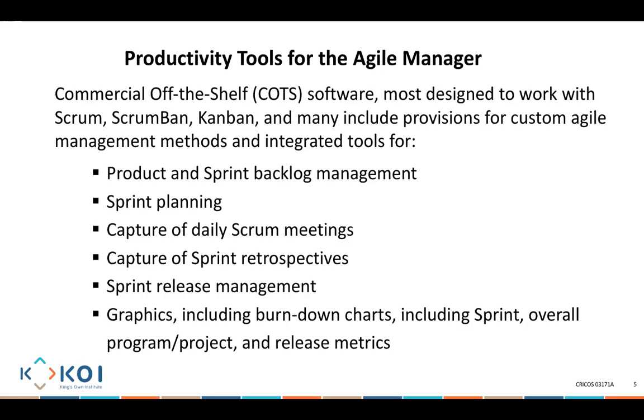As a user, or as a lecturer for example, I want to be able to log into Moodle, because that tells me what I want to do, so that I can upload lecture materials. So I have, as a user, who is the person doing the job, I want to be able to log into Moodle, what I want to do, so that I can upload materials, why I want to do it. It's really about looking at all of these three components. Now, when I have 50 features that I'm trying to deliver, that means I have 50 user stories, and these are all added to my product backlog.